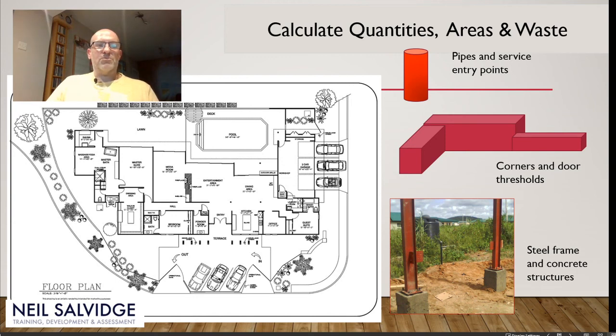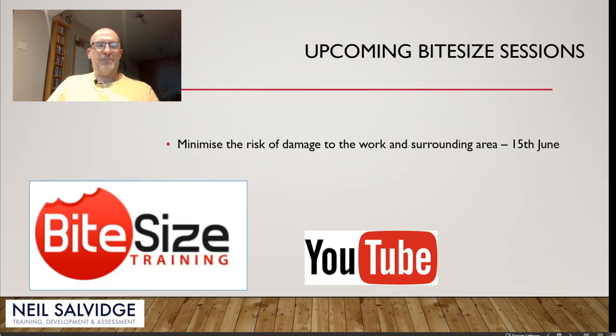What I always used to do was do an actual measure myself, get my measuring wheel out and try and work out if there's upstands on the perimeter, what that perimeter length is. It's a bit of calculation for you as a technician, but we should be showing that we're not venturing into a job blind, because it's no good ringing up at the 11th hour to tell your office you've run out of material. So that concludes that unit for us.